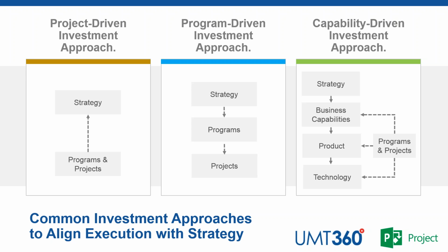For example, if I have a strategy that has no supporting capability, no ability within my organization to execute on that strategy, I may generate a program to onboard a new capability into the portfolio. If I have strategies that are dependent on poor performing capabilities, I'm going to make investments in those capabilities to improve the performance, again, through transformation vehicles, through project or program demand. So in this model, the projects and programs are generated directly from that inference between strategy and capabilities.